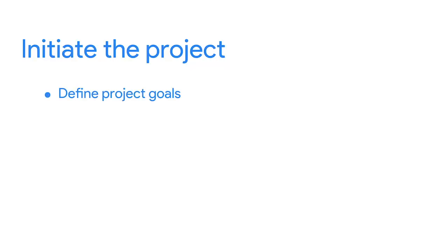The first step of the project lifecycle is to initiate the project. During initiation, you'll organize all of the information you have available to you about your project. This way, when you're ready to continue on, you'll be prepared for the next phase when you can create your plan. Defining project goals makes the details of your project clear so that you and your team can successfully complete the project. For example, if the project goal is to manage a political campaign, then some deliverables, which are specific tasks or outcomes, might be to raise $5,000 or get 500 signatures in support of your candidate's cause.